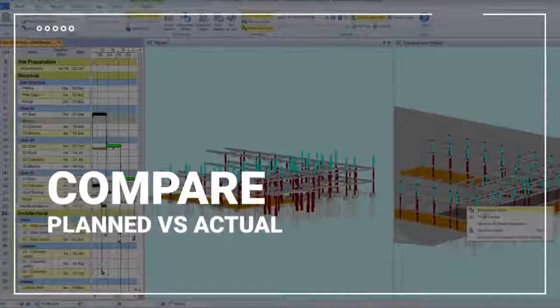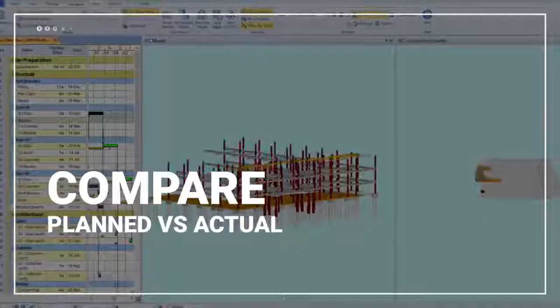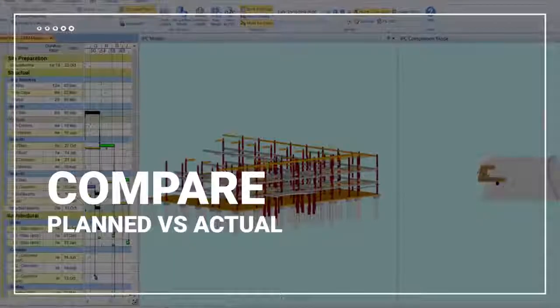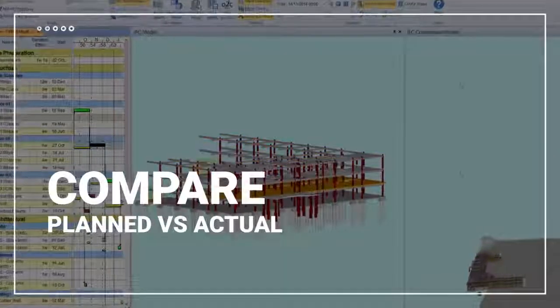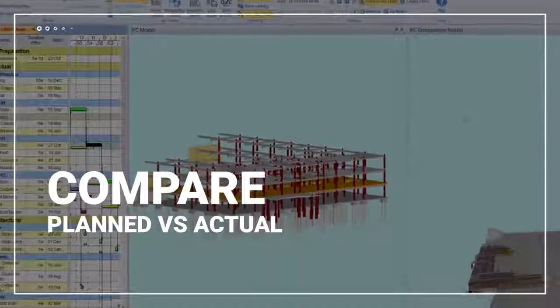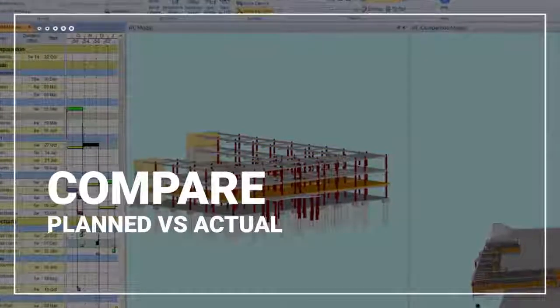Update the model and the plan as the project progresses and compare the planned and actual schedules in a clear visual comparison.